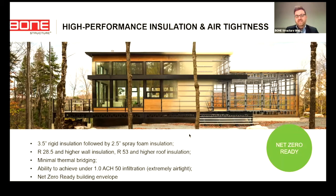As for the air tightness, as some would know who have experienced building a home, there are different methods to go about applying for a building permit. One of them is a prescriptive method where you follow the Ontario Building Code standards, and the other is a performance method, where the key is building modeling itself. So modeling the home inside a computer and putting in the heating and mechanical systems to then generate a hypothetical performance level of it. And then part two of that is a blower door test on the home.